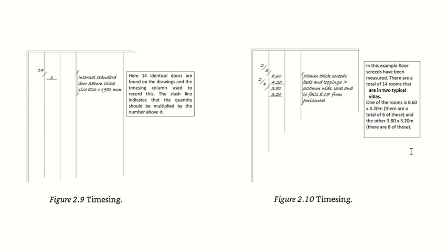This is for the 2 villas you have, because there are 2 different structures. That's why 2 is mentioned here. Then the 3 is the actual number you need in each villa. So 2 is the number of villas you have, 3 is the number you need in each villa. Got it? And the second one is again the same: 2 for 2 different villas, and 4 is the number you need in each villa. Clear? Now the question is, why didn't we write 6?